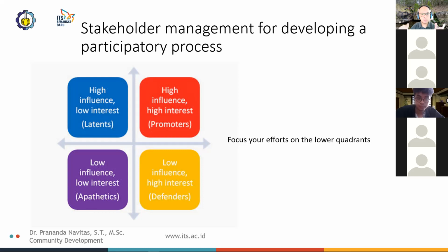So if your purpose is primarily to create a participatory process, you'll try to create an effort that takes all perspectives into consideration. You will hash out the differences and make participants the owner of your effort. Stakeholder management in that situation means trying to attract representatives of all stakeholders and treating them all as equals or colleagues,